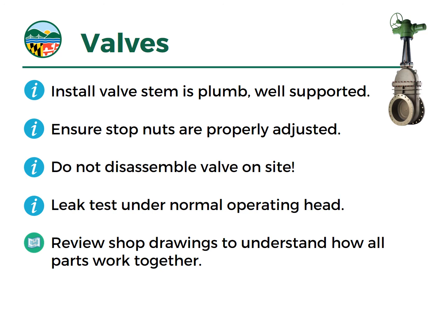Once it gets torqued, it will just buckle. You want to make sure that the stop nuts are properly adjusted. Normally there'll be some kind of limit stop nut that will prevent you from over-torquing and over-tightening a valve. We've got a case in Western Maryland recently where the contractor did not adjust the stop nut, and the first